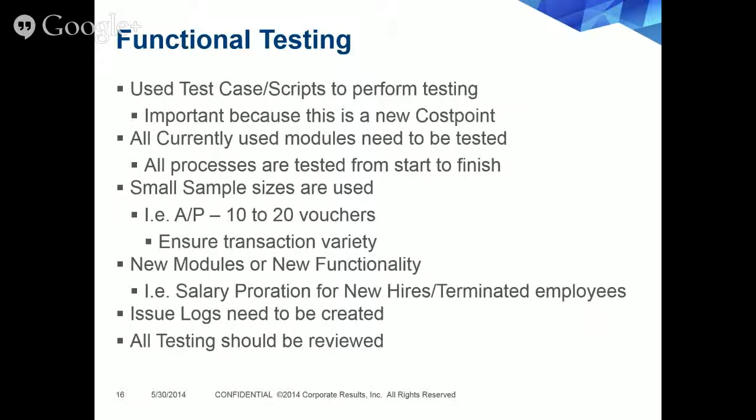Another thing with the functional testing is that all testing should be reviewed. So we typically have a functional tester test the system functionality, and then we have a manager or supervisor sign off on that functionality to ensure that it's working correctly and that there's an overview process there.